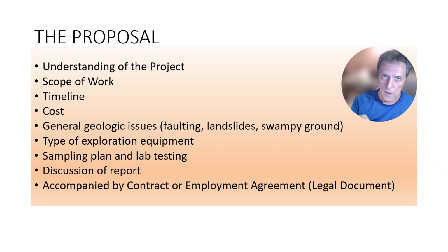And then, critically important, of course, you want to have a contract or employment agreement which is signed by the client. You want to have that signature and approval before you start any work on the investigation. I have heard of people going ahead with investigations without signatures, and that's a dangerous place to be in.